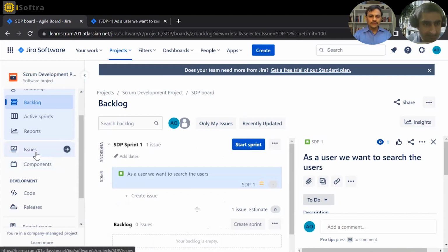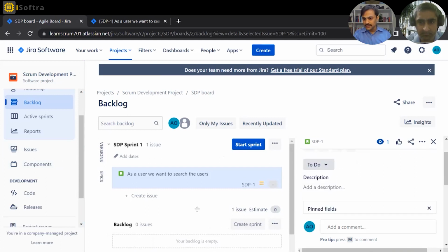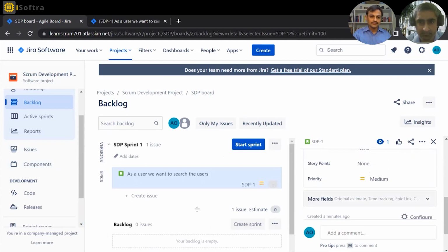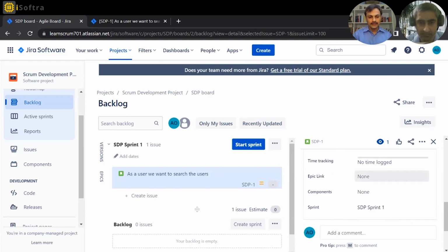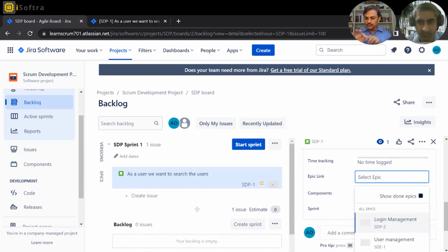So the way we usually talk in the agile world, you can have stories which are part of a child epic, that's possible here. And you can have stories which may not have a parent epic, because there could be some elements, maybe a small thing you have to do where there is no large folder. That is also possible. So you can have an item as a story without having a parent epic. And similarly, when you do release planning, which might involve multiple iterations to plan and deliver, or multiple elements from different epics to achieve the release goals, that is also possible.